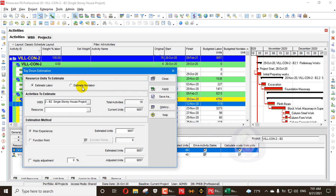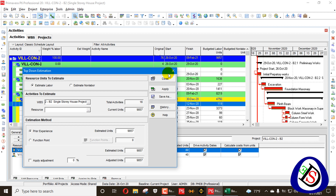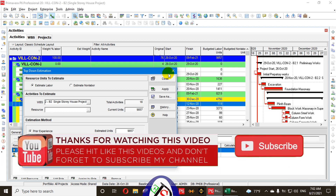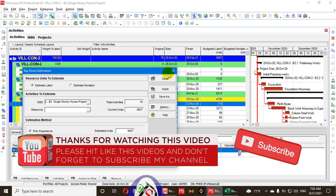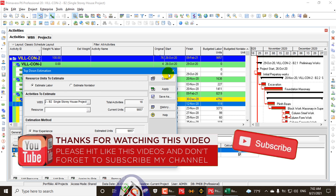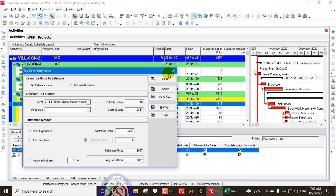You can also calculate estimate non-labor the same way — create the same process and put non-labor weightages, which will differ from labor weightages based on your own calculations. I've shown you how to import from Excel and how to use global change to convert all units easily. Also note: milestones always have an estimate weightage of 1 and cannot be updated, so milestone values should always remain 1. Thanks for watching Software Demy — please like, comment, share, subscribe, and press the bell icon. See you in the next video.